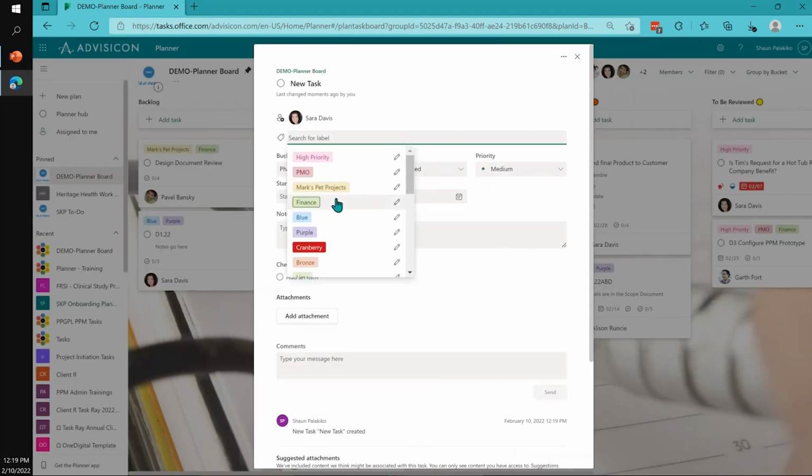You can add labels. There are 25 different labels, and you can edit them to be what you think your company, your organization needs. Now, what I suggest is, labels can be used in so many different ways, so you really have to think through as a department what's the best use of your labels. My recommendation is that you use them for either departments or individual roles. Now, why I say roles is because then that task is interchangeable no matter who sits in that role. If you have someone newly onboarded, they can slide right into that role. You can tell them, come look at the board where you see your title, that's your task. So easy transitions with new personnel, team members. So wide open, which sometimes gets organizations stuck, but so useful because it's so wide open.